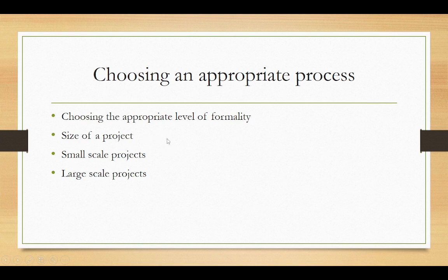Also, consider choosing the appropriate level of formality. The amount of formality in a development process varies. There are some government legislations that often require software systems to be built to support new administrative functions. Here, the developers will conform to government approved standards. The software systems should follow these standards or design methodologies. On the other hand, in certain financial areas, the software system's purpose is time to market. It is critical because if you miss out, your competitor will take the turn. When there is a need for a software system to support such a service, development is almost a race against time. So every aspect of the development process has to be tuned to meet the time to market. So there is no single development process that is appropriate for all kinds of software product. The need for a formal development process differs from the need for other types of projects.